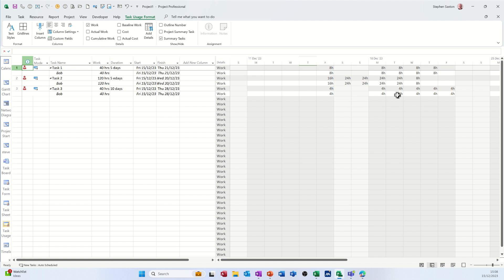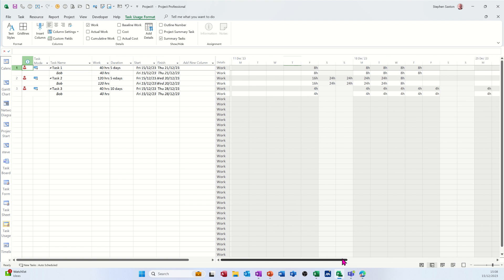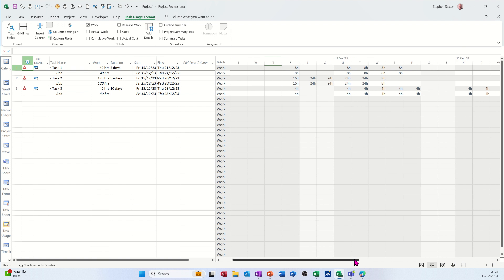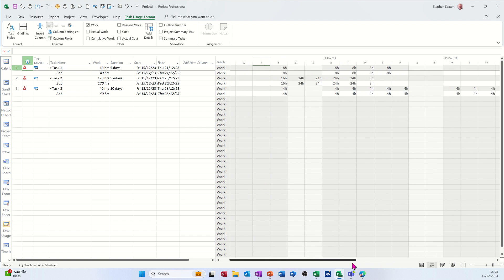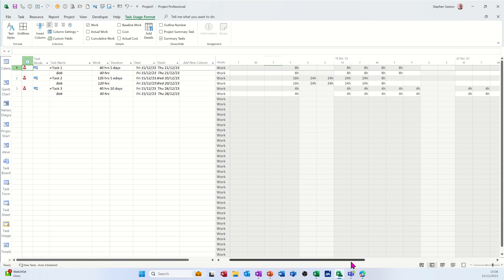So it's only doing four hours over that time period and it's been extended slightly because it can't fit that 40 hours in the time that the other one at the top is, which is just a normal duration.